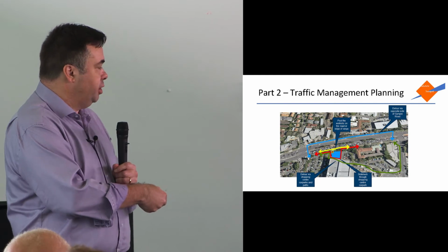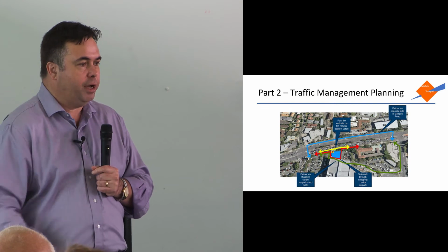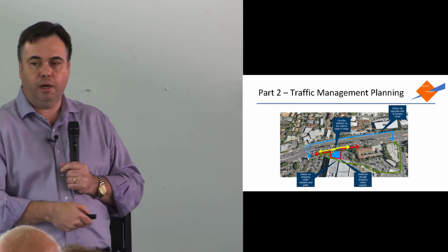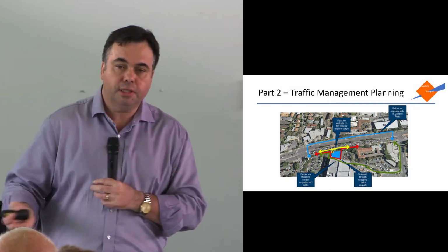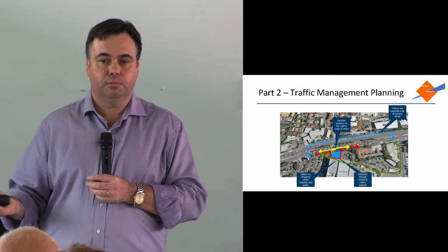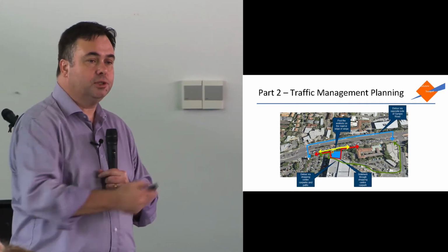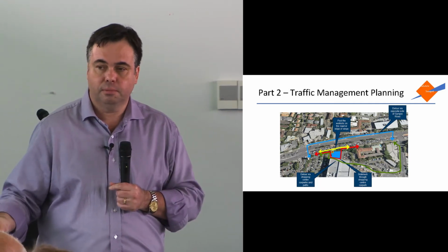Last alternative is that I could take out a lane on the road with barriers and give them a protected space on the road. But then I'd have to put in ramps down to the road and make sure it's protected, plus it gets in the way of deliveries. This is me assessing the options. Now I've just told you, probably in 2 minutes, all the options on this. Doesn't take long. But it tells you a story, doesn't it?